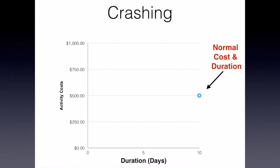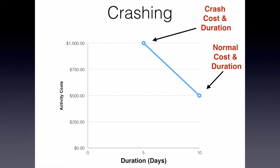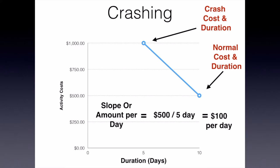What we're going to do is ask those people involved in estimating on our project: tell us, using normal techniques and normal conditions, if we added more resources to this task, how much could we shorten it by and how much would that cost? Let's say they come back and say we could shorten it to just five days, but it's going to double the price — it's going to cost $1,000 to get this activity done in five days. Assuming that information is correct, we can draw a line between these two points on our graph and calculate the slope of that line to give us the cost per day to crash or reduce this activity duration.